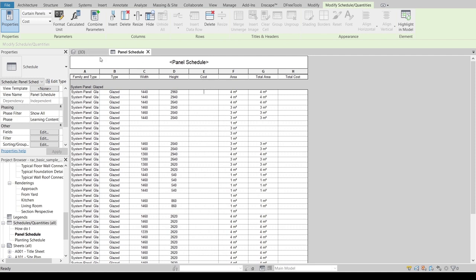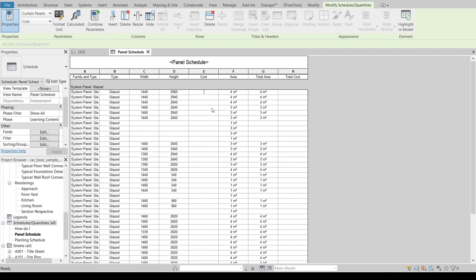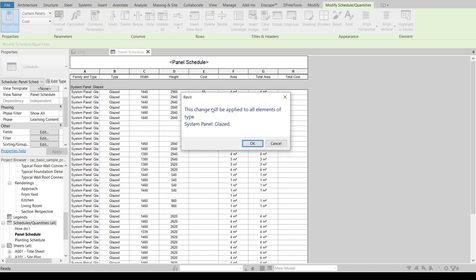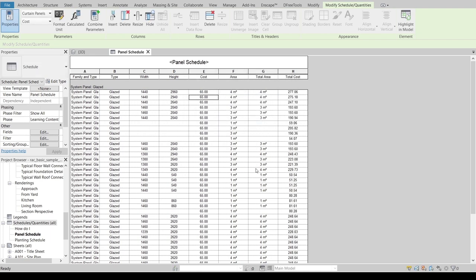I don't want to add into my panel there because my panel there I want a finalized project. When I add in here, I will consider my costing for our curtain glass panel with aluminum mullion. I will make it 65, because in my country the average is about 50 to 65 dollars. So I can hit Enter once I select that, and it will be showing up here, so I can hit OK.